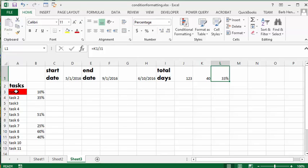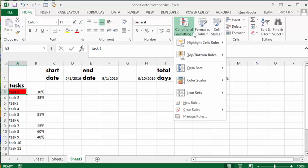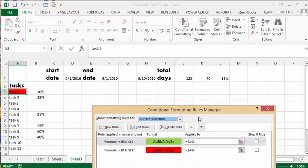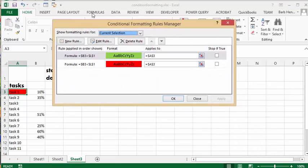You can see what I have done here. I have if it is greater than 33 percent complete it'll turn green, and if it's less it's going to turn red.